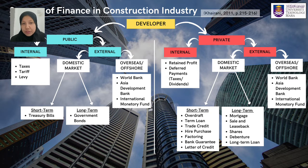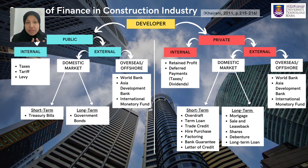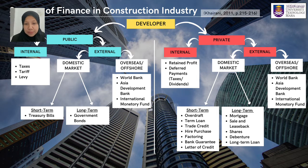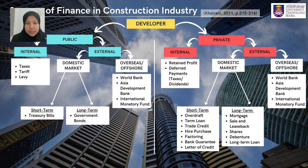For private developers, they also have internal and external source options. Internal sources come from return on profits or deferred payments such as taxes and dividends. External domestic market options include overdraft, term loan, trade credit, letter of credit, hire purchase, factoring, and bank guarantee for short-term finance. They can also apply for funds from international financial institutions such as the World Bank, Asian Development Bank, and IMF.